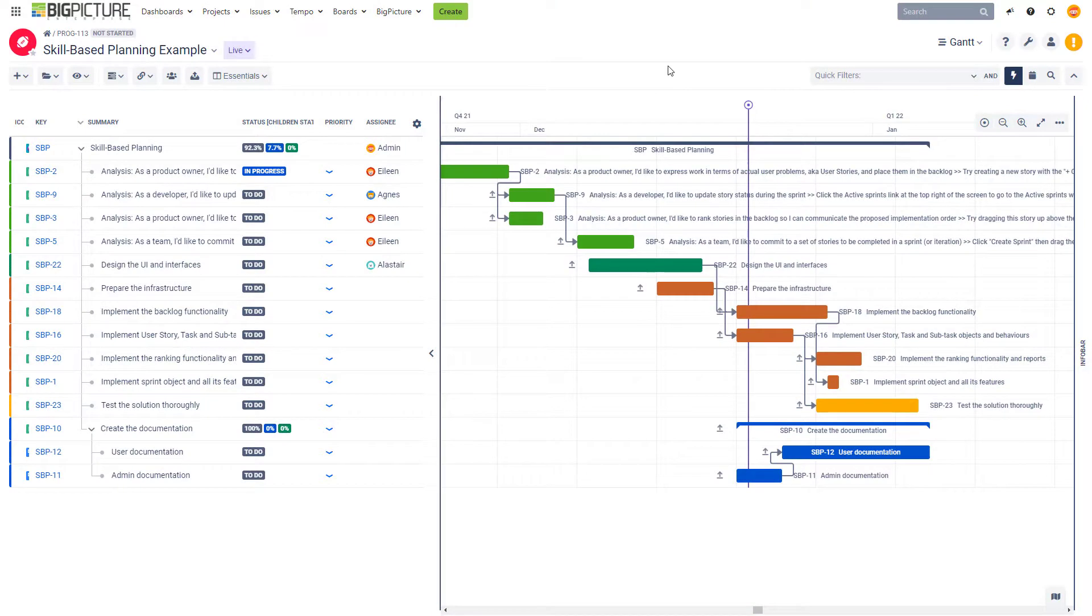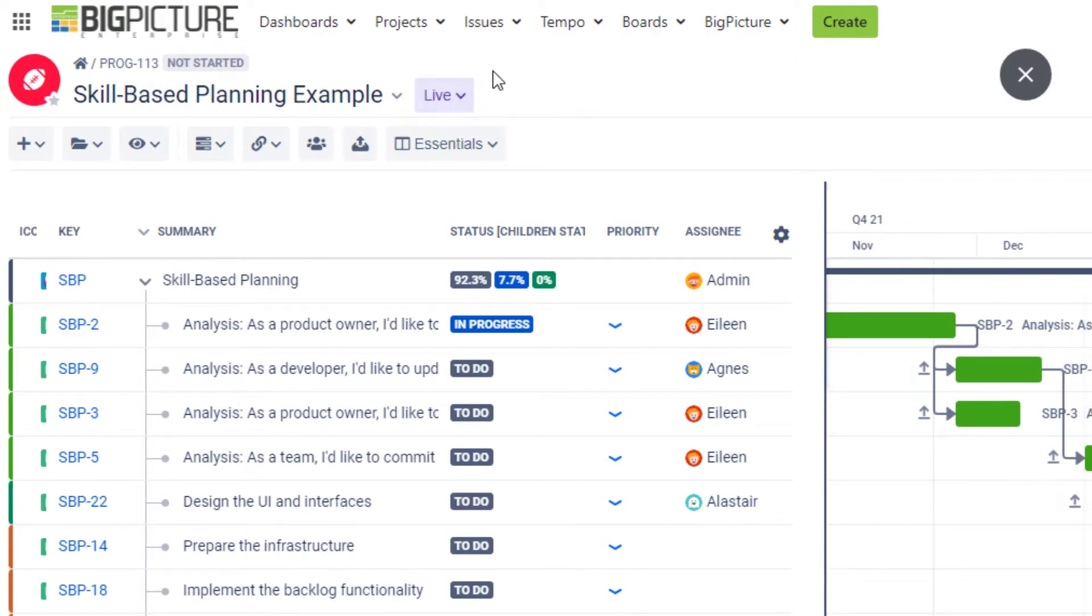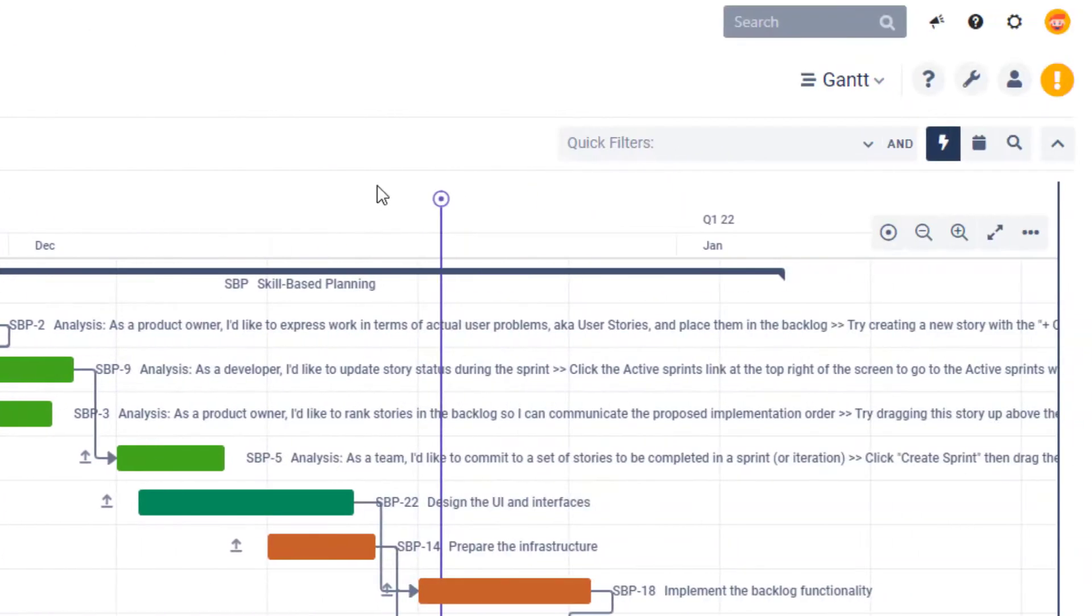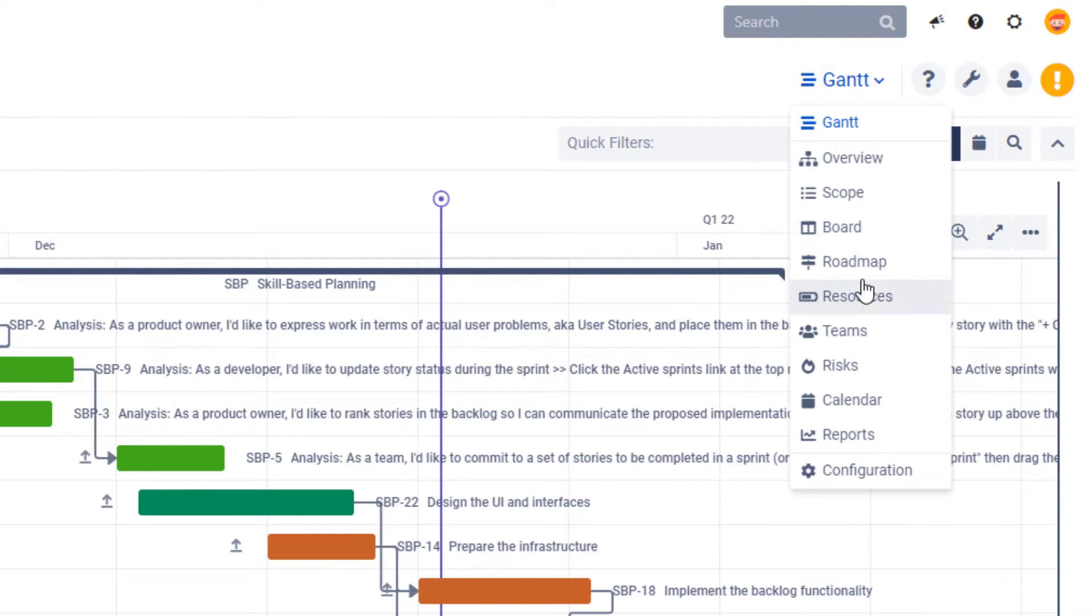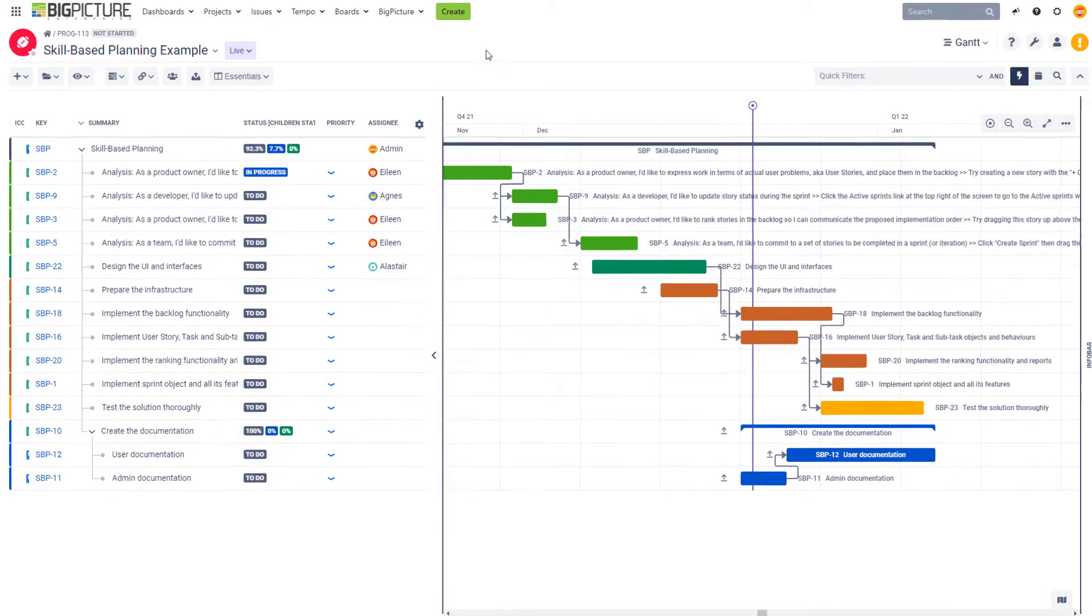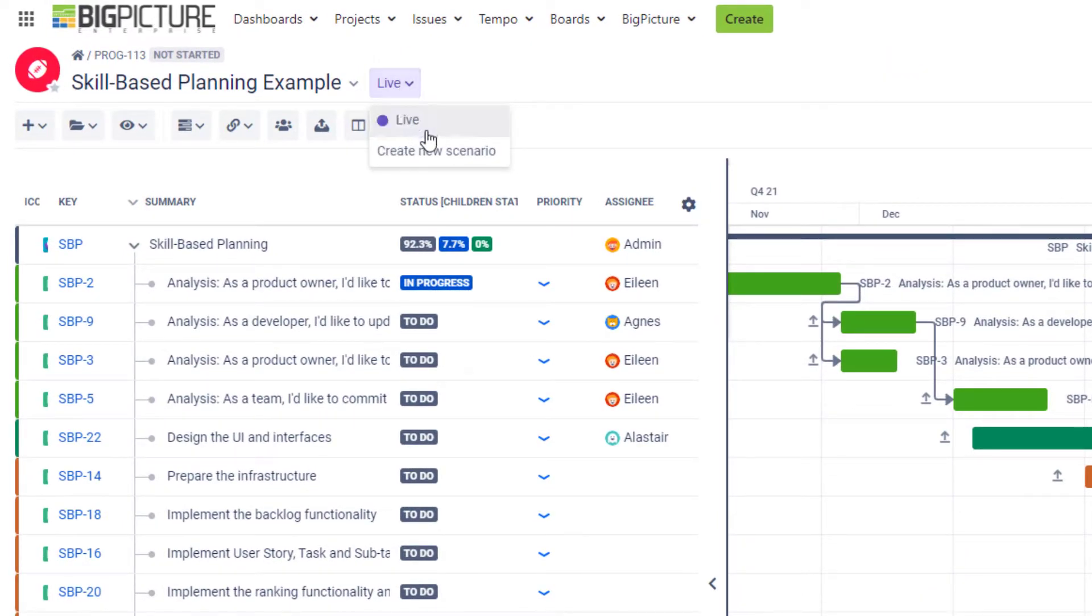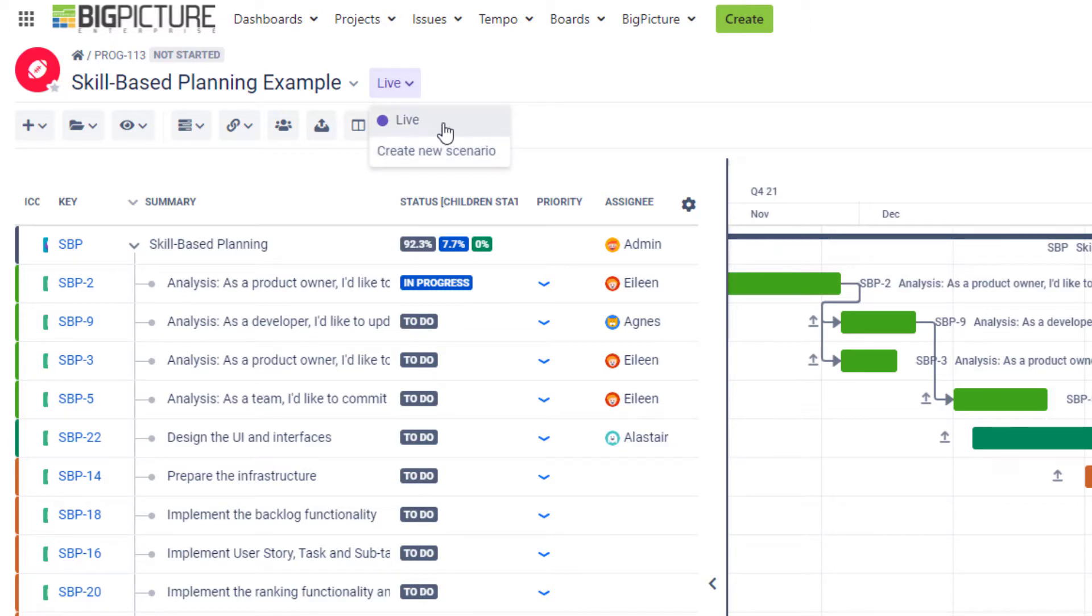The first thing I want to start with is that the scenarios are actually available in two modules. You can access them here in the Gantt module that we're looking at right now, but they're also available in the Resources module, and that makes total sense because the scenarios, at least in the current version, are all about time planning. So let's have a look at the scenarios that we have over here. If you expand this dropdown, you'll see that there's actually just a live scenario, which means that we don't have any actual alternative scenario just yet.